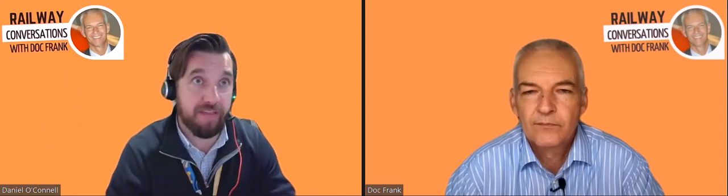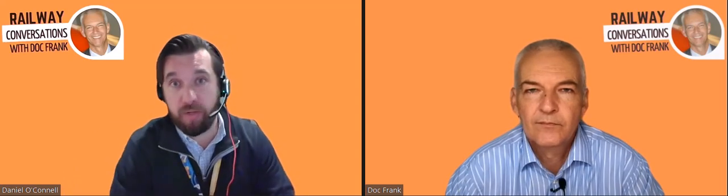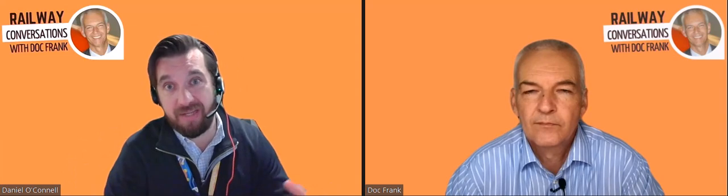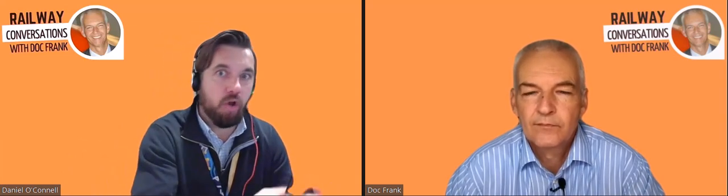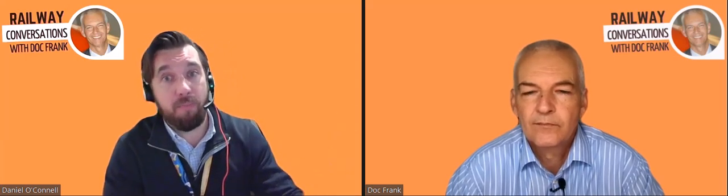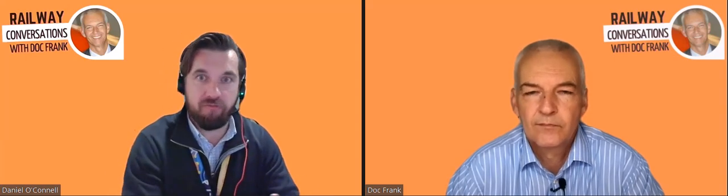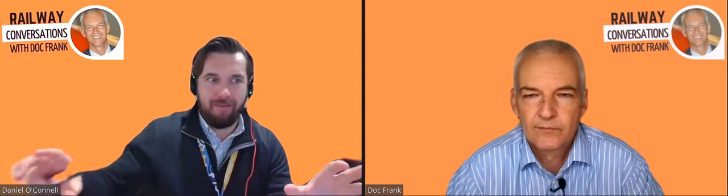And in parallel to that, the way that I would literally deliver a project, every 6 weeks, we have a week shutdown of testing. What does that give us? That gives us time to deploy any new software, if we found errors or logs, but it also gives the construction and maintenance team time to go back and resolve any works, but also give the test teams a little bit of respite as well. So that's the way that I would look at that whole delivery cycle from end to end.